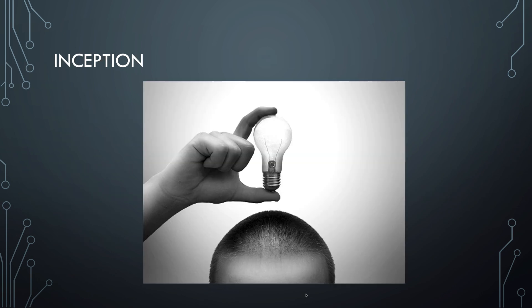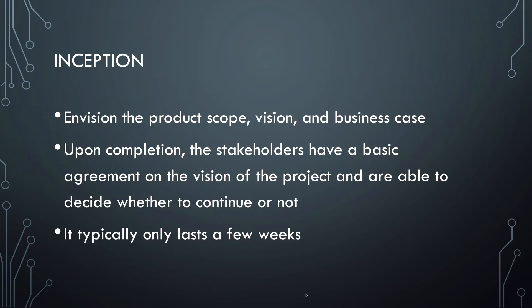The goal of inception is to determine what problem the software is going to solve, what the scope is of the software, the vision of what the software is going to be like, and an analysis of how the software fits into the business. Often a part of the inception step is a go-no-go decision on whether to continue with the project. Typically this phase lasts a few weeks maximum.